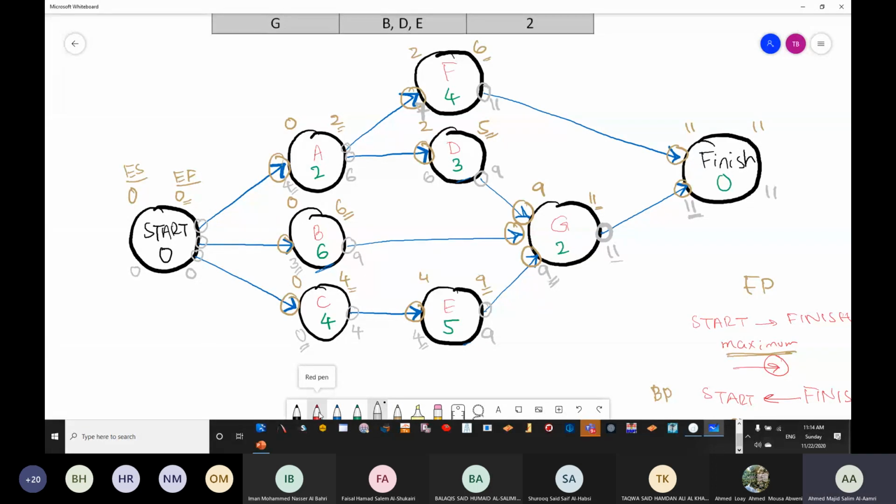Now, if I told you I'm going to give you 2 weeks, and you need 3 days to finish this work. The total time is 14 days, and out of the 2 weeks you need to choose 3 days only, so you have a lot of gap. It means that the task is not critical because you have gaps. If you didn't do it in the first day, you'll do it in the second day. If not the second day, the third day, and it goes on.